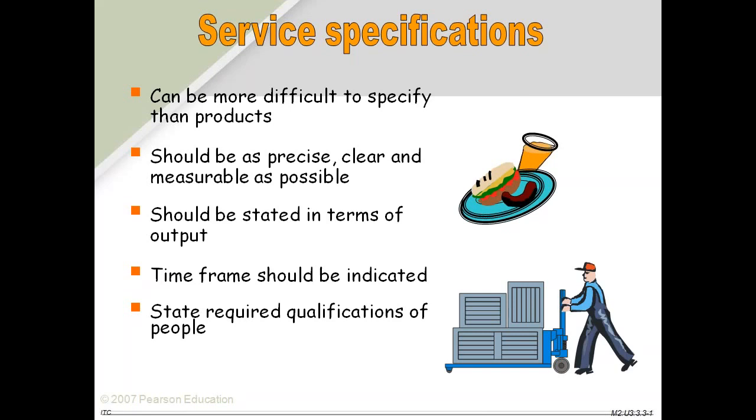Then we'll also spell out whom this person is going to report to. What inputs are going to be provided by the company? Is the company providing a space for the guy to stand? Is the company giving some table or chair or computers to work? So there has to be clear specification. How many reports are required? Do we need a weekly report? Do we need a daily report? All those things need to be spelled out, and the time frame, under what period this job has to be done.